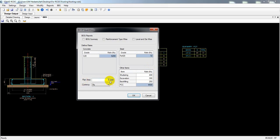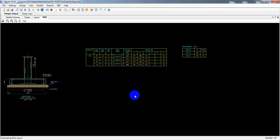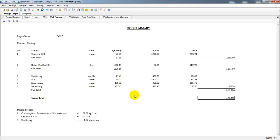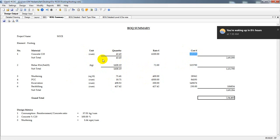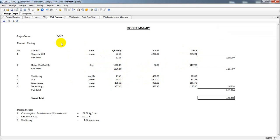After setting the plan area, I'll select the Bill of Quantity options: summary bill of quantity, bill of quantity for reinforcement type-wise, and bill of quantity level and diameter-wise. I'll click OK to generate. The total cost for all footings comes to seven lakh and something. This is not for one footing — it's for all footings. It shows different rates, total steel requirement, and total concrete cost.